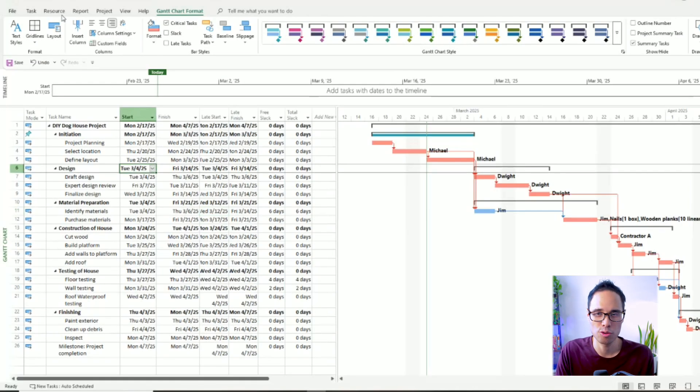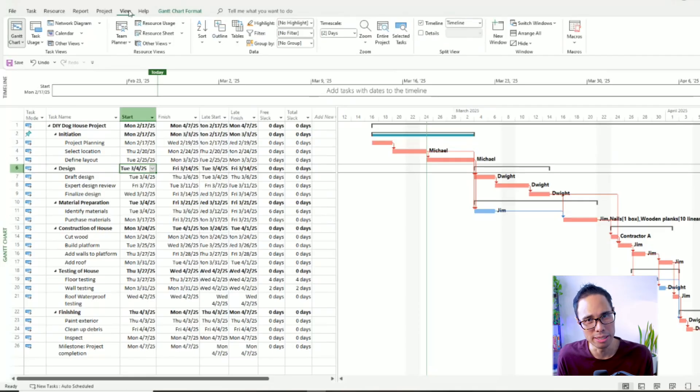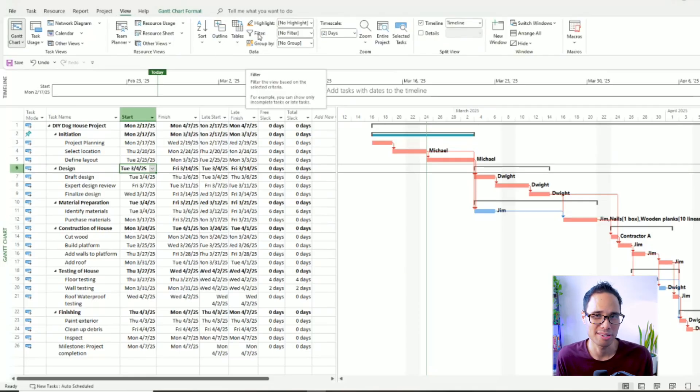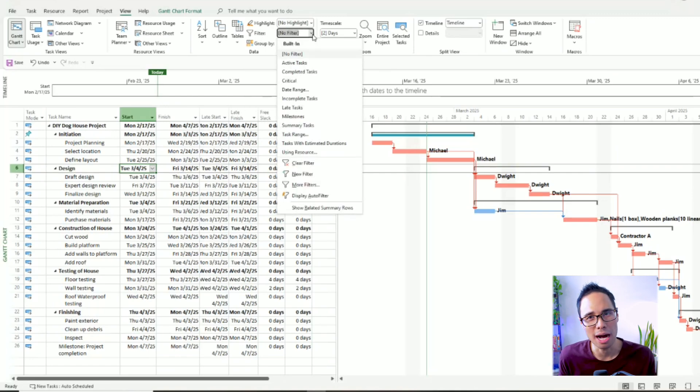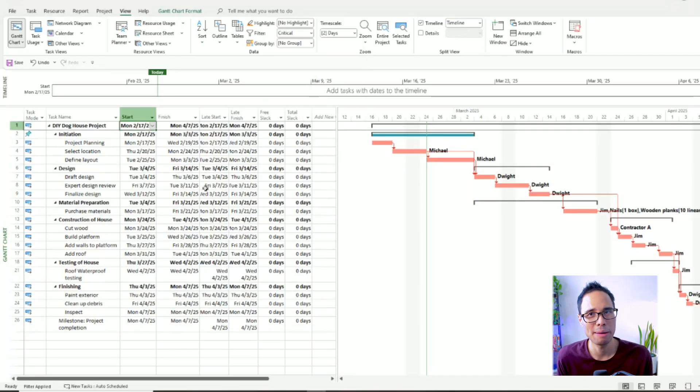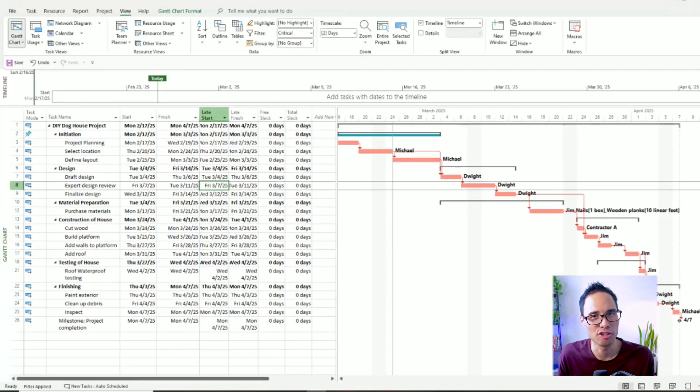To only show a list of your critical path tasks, move your mouse to the View tab on your top ribbon. Then inside the data panel, move your mouse to the option where it says Filter. Click on the drop-down menu and choose the option that says Critical. When you do that, only your critical path tasks will appear on your table and on your Gantt chart. It's kind of like magic. And this is the most helpful shortcut that I use to manage my projects.